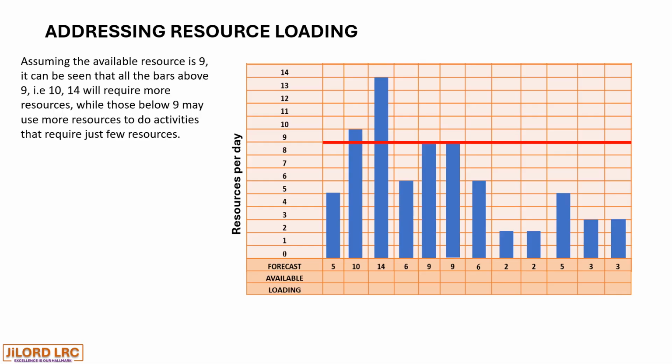Day 4, which is 6, will also have spare capacity because the resources that have been forecasted is only 6, but the resources available is 9.